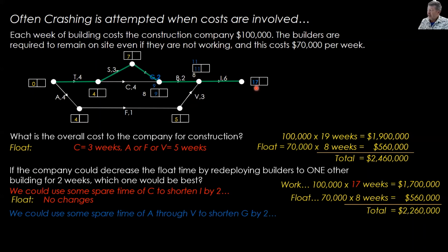Well, that hasn't changed much, has it? I'll change it down here though, just so we're in blue so we can see. That hasn't changed. All right, now we've got to work backwards. 17 take away 6 is, correct, 11. We'll do the top way. 11 take away 2 is 9. That's still critical path, isn't it? 9 take away the 2 is 7. 7 take away 3 becomes, well, that's on top again, so that's 4.